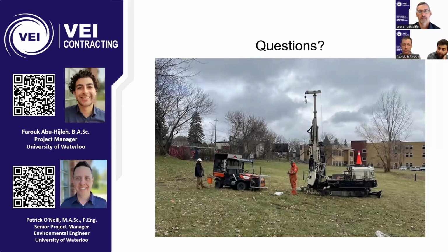It's a little unfair to say what's the cost of one HPT dissipation test versus one slug test, because you're comparing apples and oranges in a way. If you're going to be doing one HPT test, you're actually going to probably be out there for an entire day. The cost of that, probably about $6,000 a day, plus or minus mob and overnights and stuff like that.